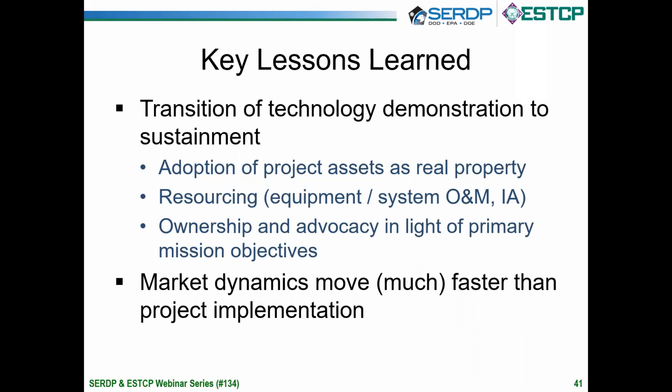This project, we started in the beginning of 2017. So during 2017 to the end of the project, October 2020, the market for frequency regulation, for example, changed quite a bit. The value of frequency regulation went down. It's still the largest value stream for this system, but it went down notably. So the market dynamics are significantly faster than the way these DoD projects can be executed, and that's something that you need to be mindful of, because if you build your whole business case around something that could change over the course of a couple of years, that can become an issue on the economic front.